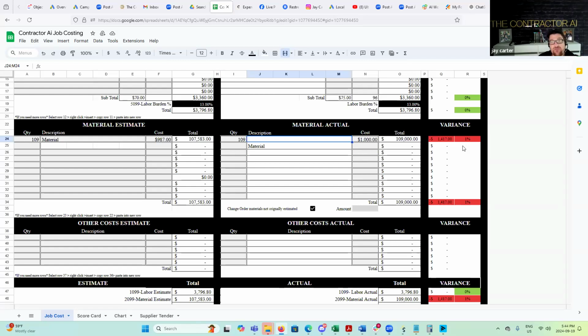Let's say you have a supplier that's giving you credit, okay? A hardware store, whatever. You can call in the material you need from every job, and you're giving that in bulk. Now they know what to order. They're ordering specifically for you. You've confirmed that material. First of all, you won't have any material delays. That's a win all on its own.